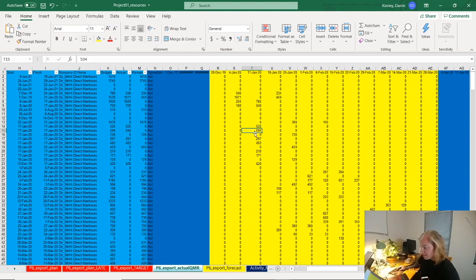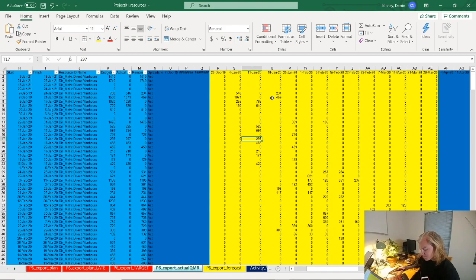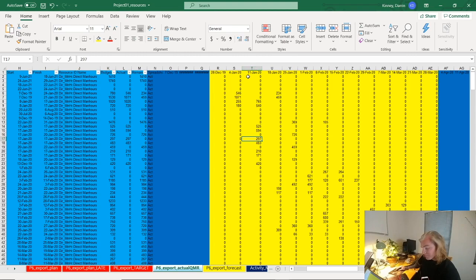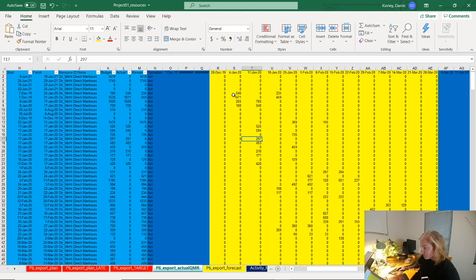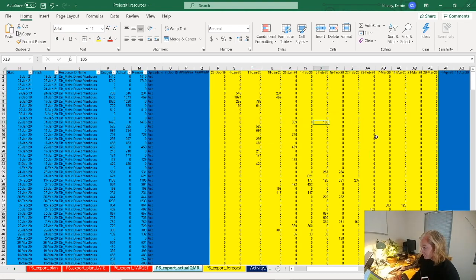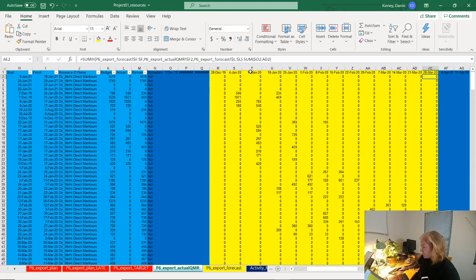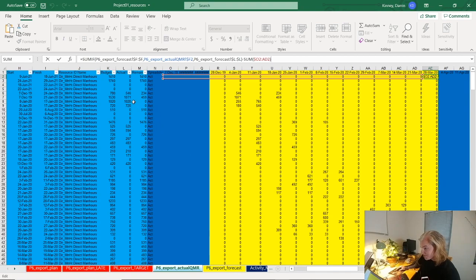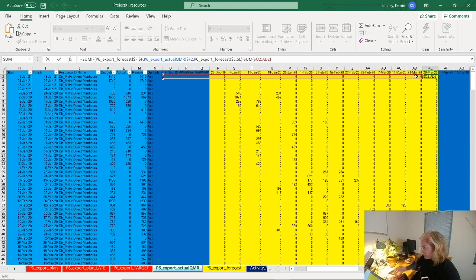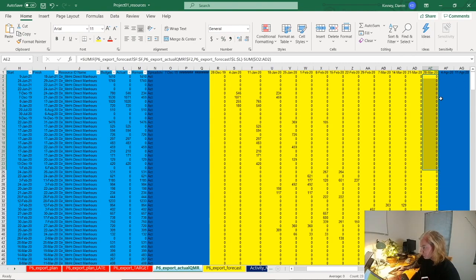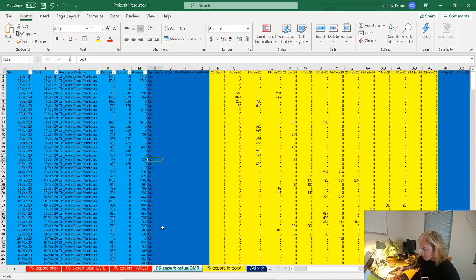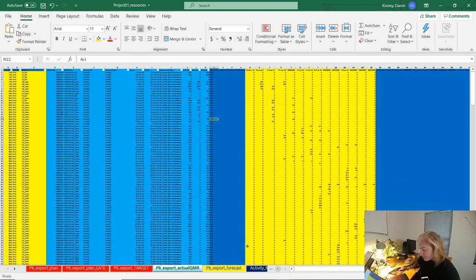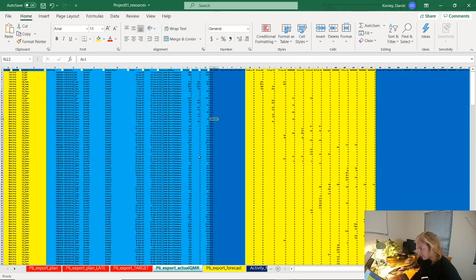I've actually had to manually capture every week what the actual units are for each activity. There's a couple different ways to do this. You could actually capture the percent complete and the forecast units - you'd probably have to have two different tabs because every week might have a different forecast. Here I just do the calculation where I'm pulling in the earned units every period. Current week - that's just going to be a lookup going into my forecast saying what my current earned is for that activity and subtracting off what my prior earned is. I just get an incremental. Every week I just copy these as values and then move the formulas over to the next week and call this data series 'actual.' It's a pretty simple setup and it works quite well.